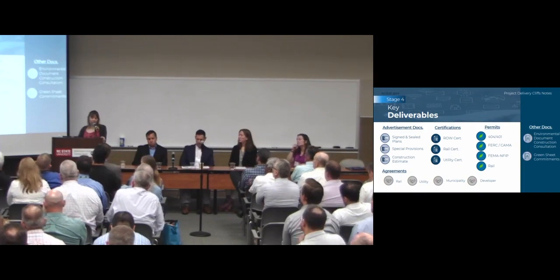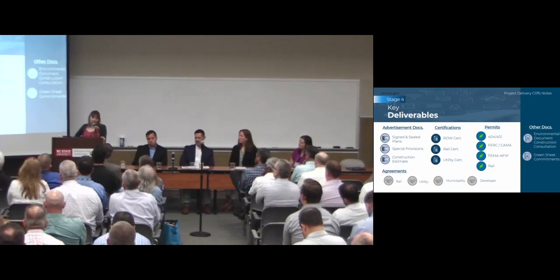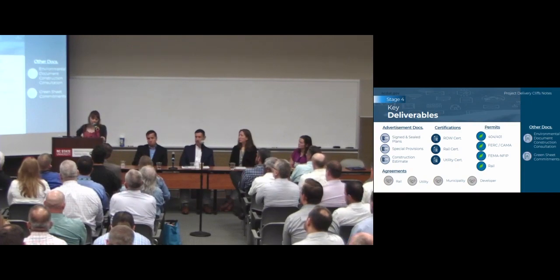We also have the construction estimate or the engineer's estimate. This is different than those intermittent construction verified cost estimates that we submit. At PS&E time, the project manager is going to submit quantities for the engineering section, the estimate section, to apply their cost estimates to, and that'll become the confidential engineer's estimate, which they'll use to compare to how the project gets let. That must be held confidential until the project is let.